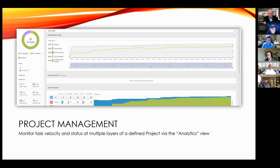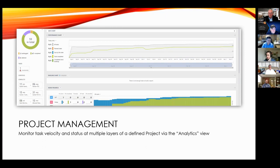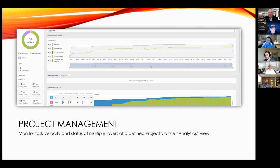Speaking on project management, if you do love to dig into the numbers and get pretty charts and graphs, Wrike provides an analytics view similar to their Gantt view or their Agile Kanban board view that shows performance, work progress. And if you're familiar with the terms burn down or velocity charts, Wrike is able to automatically deliver those as a separate tab. So I can view, as a lover of data and numbers, the analytics tab, while my engineers can look at a list view or a table view of their tasks depending on their preference. This is also good when speaking to the other directors and the executive teams to show progress, completion, expectations, velocity, and areas like that.